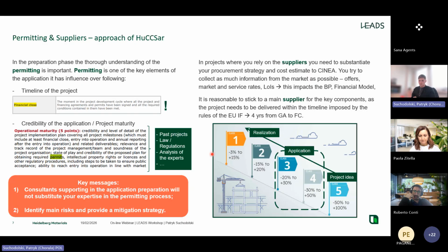underestimate how much work you will need to do with the permitting processes, because as I stated before, the innovation which you are bringing into the market will bring the attention of different authorities. They will ask you more questions about how the technology works, what the wastes and products of this technology are, how you will approach the environmental, let's say, sound of the project, and so on.